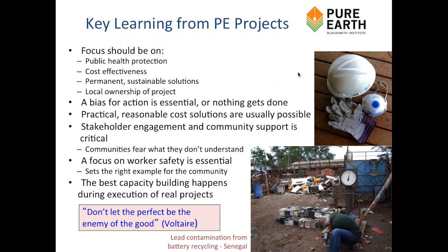Okay, as I mentioned, in every single project that I or Blacksmith has ever done related to lead, the question of groundwater contamination has come up. First, the first answer is to sample the groundwater. Where there are wells nearby or water bodies nearby, ponds or streams, you sample that.